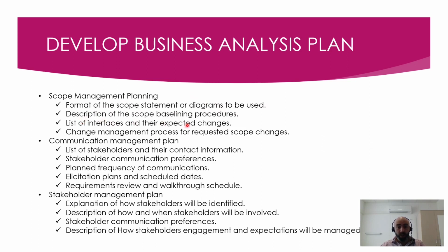Description of the scope baselining procedure, because as we said in planning, I'm going to baseline the solution scope, and after that I will have a change control process for any changes in scope. We need to be mindful of scope creep. That's why we need a change control process in place.